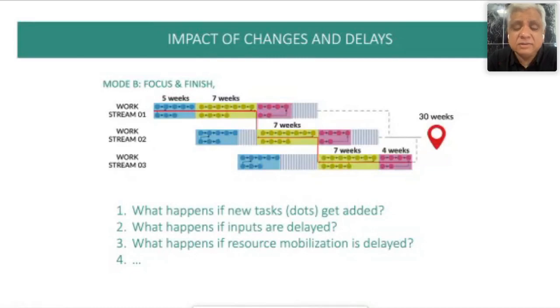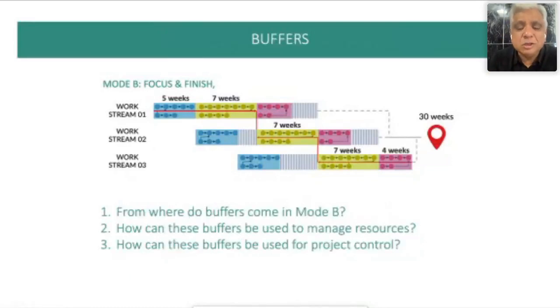That is great, because now what that means is that as a project manager, I need to just be worried about how much buffer I am losing. As long as I have enough buffer, I know my blue box is not going to delay my critical path. As long as I have my buffer, I know that whatever prediction I'm getting, I'm going to achieve it.